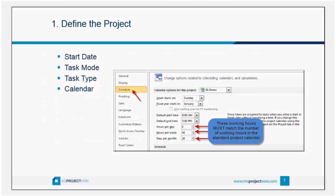In particular with your calendar, if you're going to use anything other than a typical eight-hours-a-day, five-days-a-week standard calendar — for example, six hours a day instead — you've got to make changes in your calendar options. Not just applying the calendar to the project, but also changing the way Project calculates one day. You need to tell it that one day is now the equivalent of six hours instead of eight.